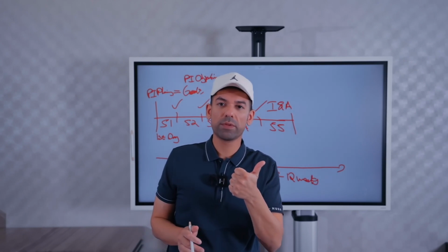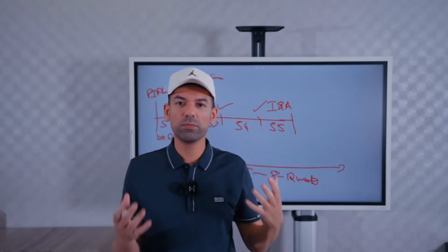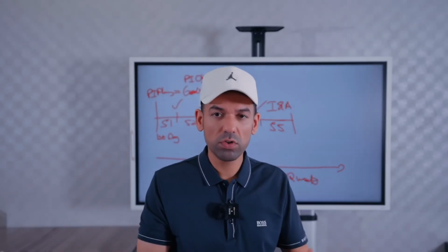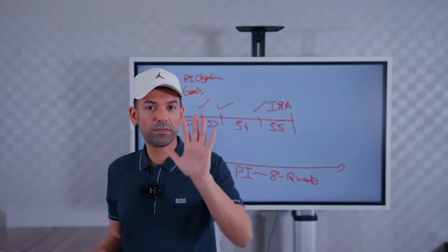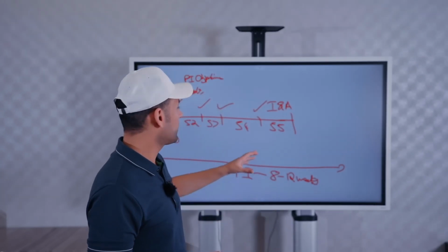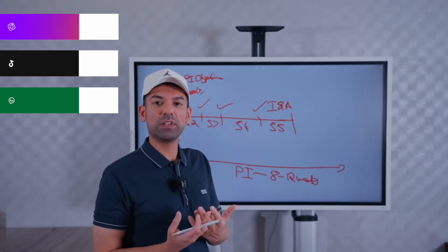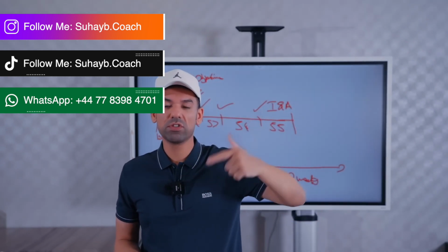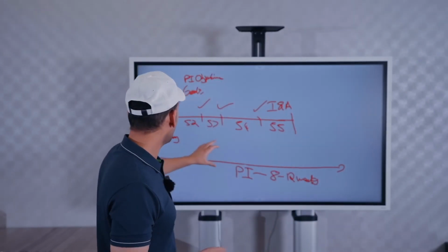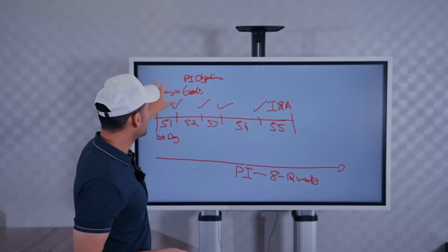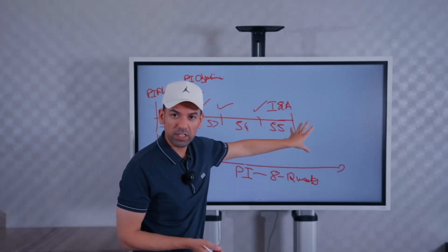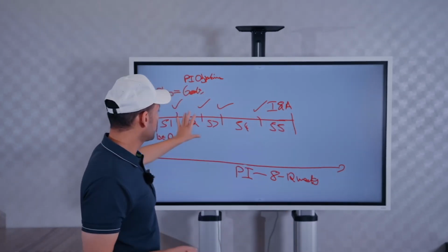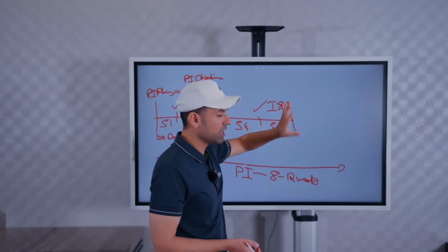You had 10 requirements. These 10 requirements, we're going to call them loosely 10 features. These 10 features we're going to distribute, 2 or maybe 3, amongst every one of the 5 Agile teams that we've got. Those 5 Agile teams are going to work in an Agile Release Train structure with a product manager, a release train engineer, and a system architect. And as they're working in there, those individuals will be coordinating all these 5 teams. These 5 teams will be working on their 2 features, and as they're working on the 2 features, they'll be collaborating and trying to deliver it.